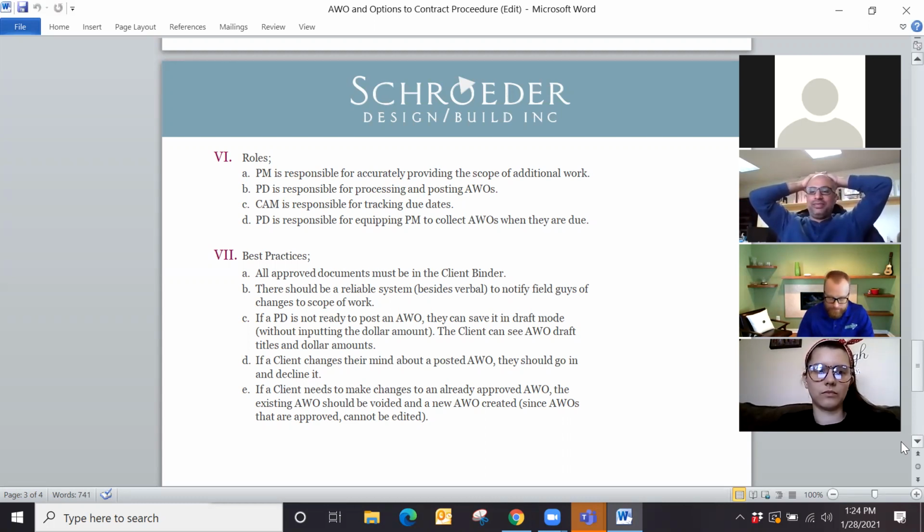A good example that I can think about is Wisdom, Ariel. We had a lot of back and forth with them because they were confused about what we were referencing when we posted it. If it's a language clarification, that's something that the PDs can answer. Like the client saying, I don't understand why we're being charged for the GFCI, it's already in contract. And we're saying, no, it's the actual wiring for it. That's something that the PDs can clarify, no problem. If it's anything more than that, I think the PM should be the one having that conversation with the client, get it clarified, get the PDs to make any edits they need to, and then move forward from there.